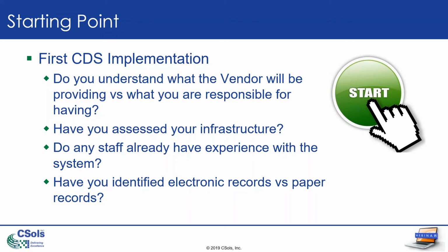take some time to understand what the vendor will provide in terms of documentation for their system, evidence of their testing. Will they provide configuration support? Will they provide infrastructure support? Just getting a good understanding of where the vendor comes from and what's left for you to defend. It's critical to when you're starting out a project.